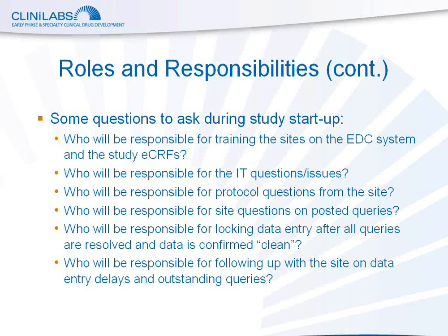It is important to establish answers to these questions at the start of the study and confirm each study team individual is aware of his or her responsibilities. One important idea here is to streamline the responsibilities as much as possible and have as few people as possible responsible for each of these areas. This now leads us to the next and final section,